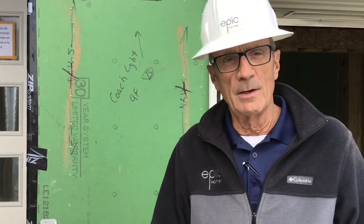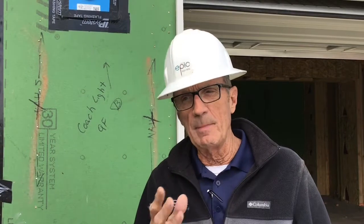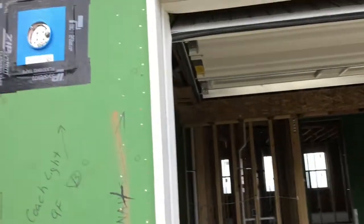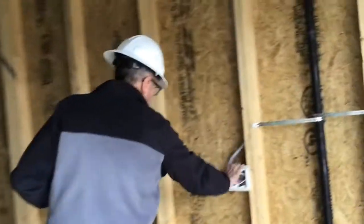So that they're moving up the street. We've got them over on the other side right now. But as soon as they're finished with that house, they'll be moving to this one to set scaffolding. So that's going to happen, probably masonry lath within the next week and stucco lath about 2 weeks out. So, coach light on either side of the two-stall garage. Inside, you have requested car charger outlets, one on each side of the two-stall, and they are in.